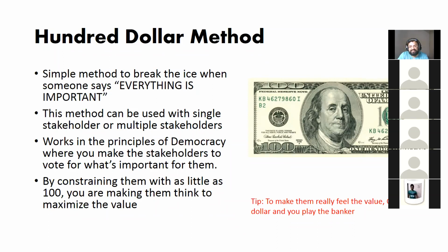Now let's say time is fixed, budget is fixed, and scope is also fixed. What can you tell the client or the stakeholder? You three are basically fixed. Ask them to redefine the scope. Exactly. So in your case, what would be the answer? You tell them, you are saying I have this much budget, this is the process I need to automate, and this is the time I need to finish. But with our analysis, we cannot do X amount of work, but we can always do X minus Y. Now tell me, what do we need to focus on first?